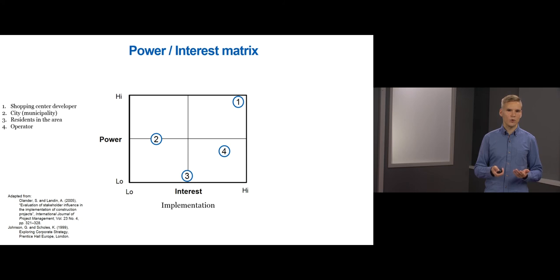The residents, on the other hand, lose their power to influence decisions because they can no longer appeal against the plans that have been accepted. At this stage, the operator's interest has increased, as they are concerned about how the project progresses and when it will be handed over to them. However, operators do not have much power to influence the decisions regarding implementation, because the plans have been finalized.